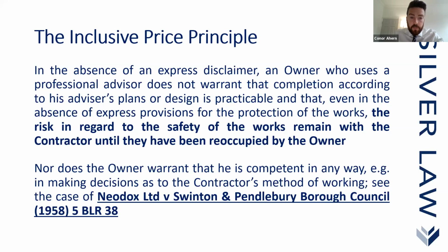Nor does the owner warrant that he is competent in any way in making decisions as to the contractor's method of working. And this happened in the case of Neodocs versus Swinton and Pendlebury Borough Council. Now, in that case, Neodocs was the contractor, Swinton was the council. Swinton had an engineer who basically told the contractor, not instructed, I guess, that he had to work in an alternative way. The contractor obviously made an application for additional time or money.